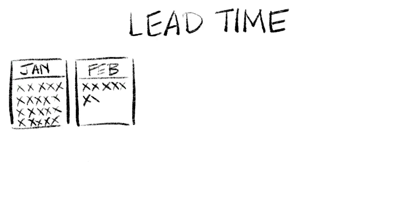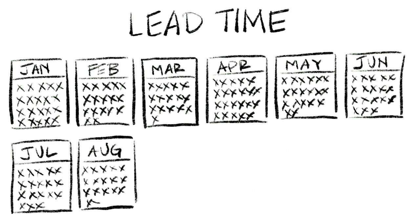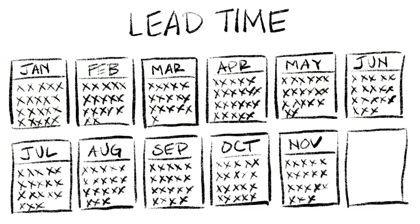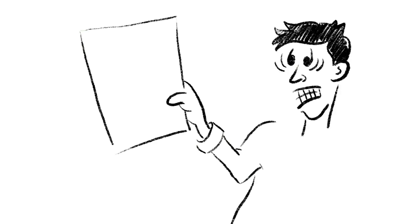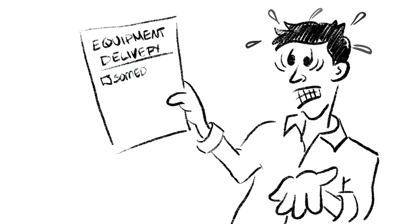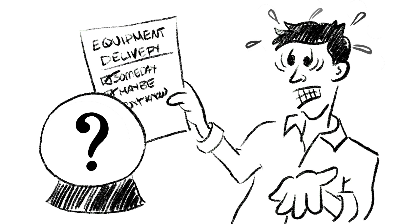Switches with 12-month lead times? That's no longer the exception. That's the rule. It's impossible to predict when hardware will arrive. For now, and honestly, for the foreseeable future.